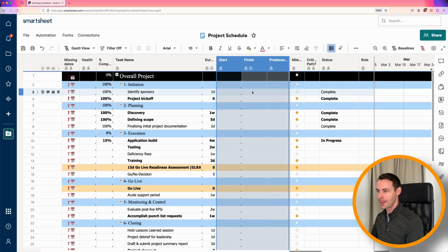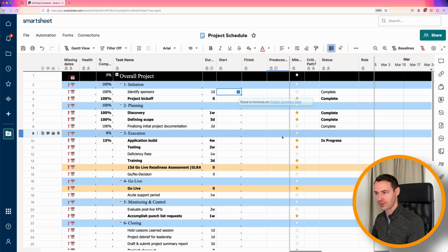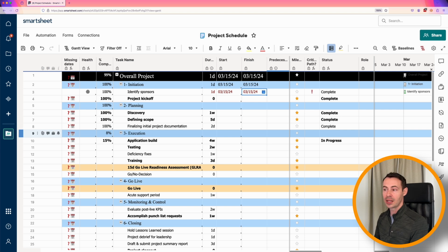And this still works as a project plan. You have not broken any of the reporting that we do for any of the other links that we have. It's just getting you to a spot where you can work with the plan the way that you're most comfortable working with the plan. Because we no longer have predecessor relationships defined, we would have to go in and set whatever dates we think are appropriate, and that's one task for one entry that I've done so far. Come down to the next row, and if we think this needs to start shortly thereafter, now I've done a second row, and you can work your way through the plan as you need to.